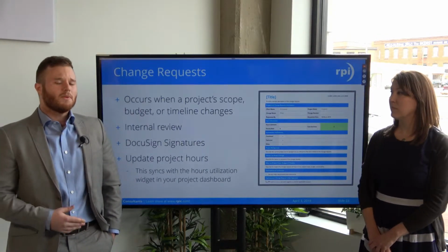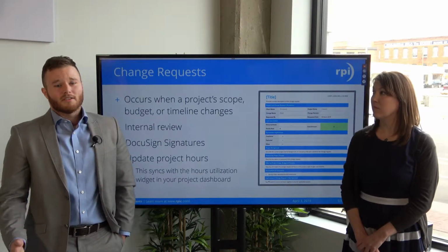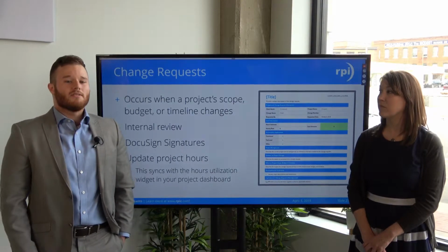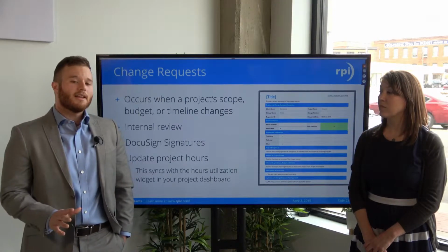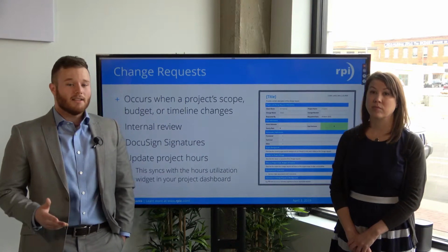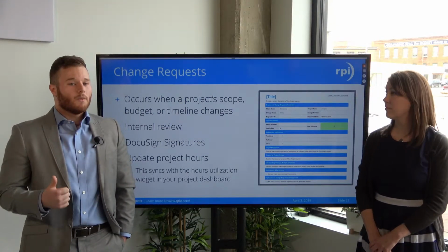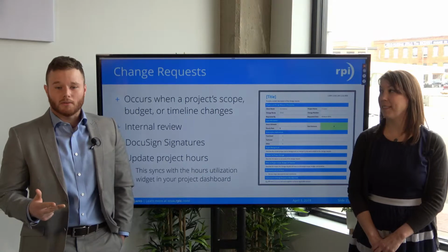A change request could also be used during the discovery phase if a consultant runs into a situation where a component that has already been scoped for is not needed. That means that the scope, budget, and timeline would all be reduced.